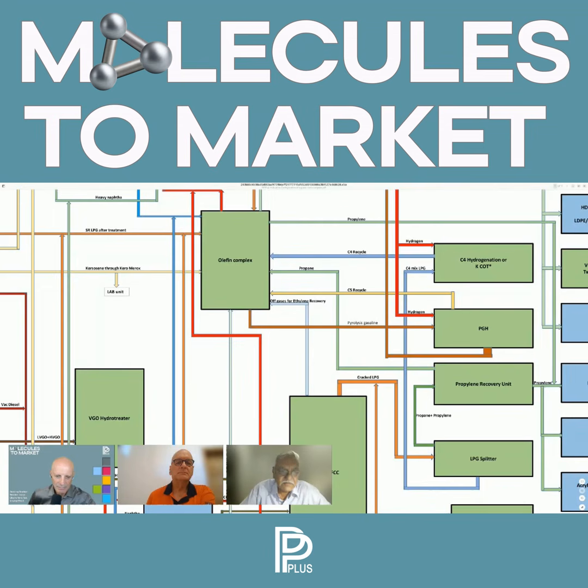Second part is all hardware in terms of heat exchangers and air coolers. They should be sized. Sized means they should be thermally engineered. If they are not thermally engineered, then number of shells etc. are not known. They come as a part of detailing later on. So it's a lot of interface work. PNID has to be changed, revisited. So we keep it in the scope of the licensor and let him do the thermal design and air cooler designs and all the bundle configuration and exchanger arrangements. They have to reflect in and show in the PNIDs. My PNID is getting more and more complete. So this is the second part.